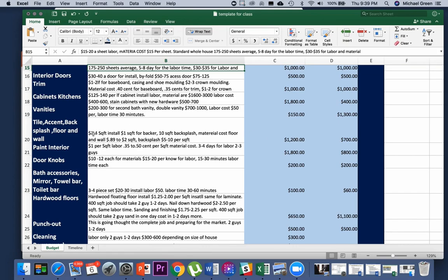If you really want to start measuring out, you can see that it's $3 to $4 a foot to install, $1 for the backer board. The backer board is the board that goes under tile. You've got $10 a square foot for installation of backsplash, because that's a little more expensive, because that stuff goes on your countertops. It's not a lot to do.